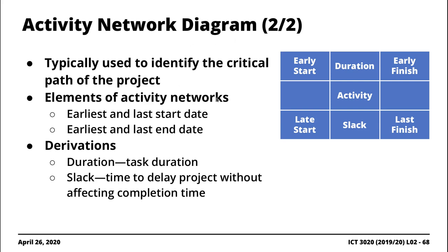This diagram is typically used to identify the critical path. Key elements include the early start date, early finish date, late start date, late finish date, the duration associated with the task, the slack, and the activity name.